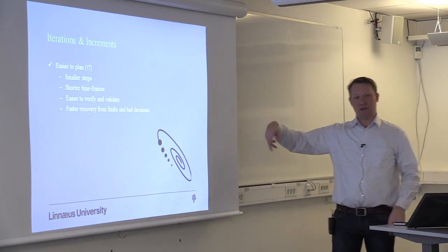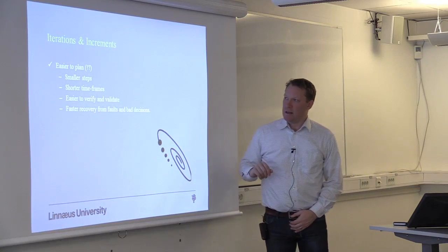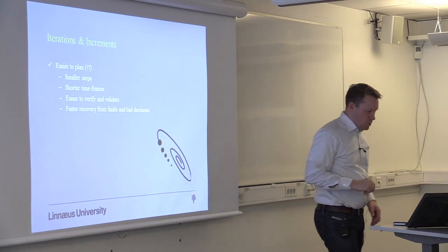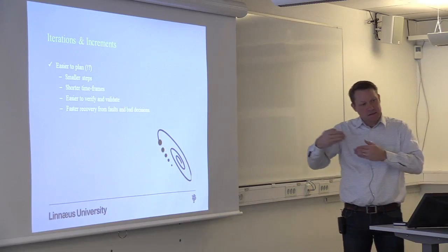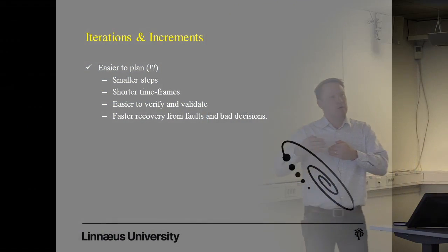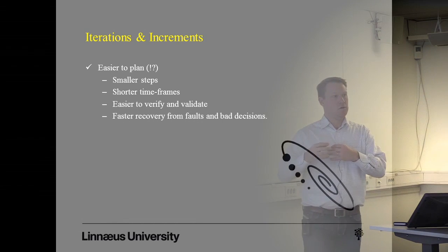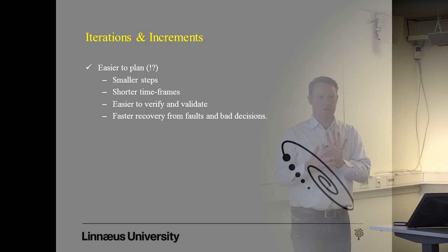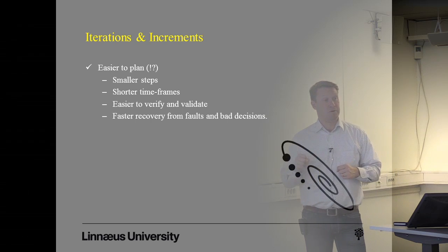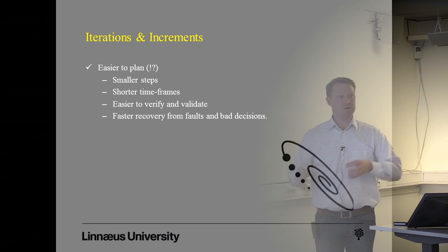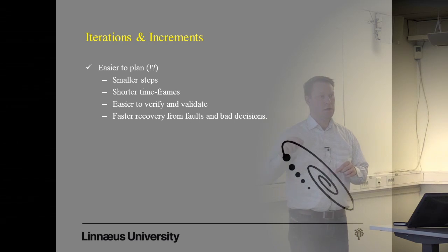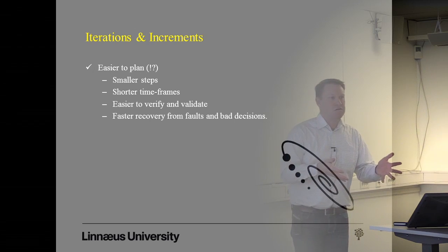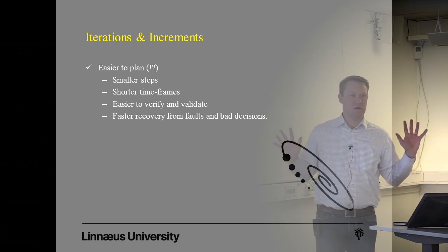So instead, we can shift focus slightly and see if we can shorten the time in between our releases, because a release is a very useful interaction point with customers. Please have a look at our release. Is it something that you want or not? So with the swing example, for instance, if the architect could have visualized the swing they designed, the customers would probably have said, no, this is not what we wanted.